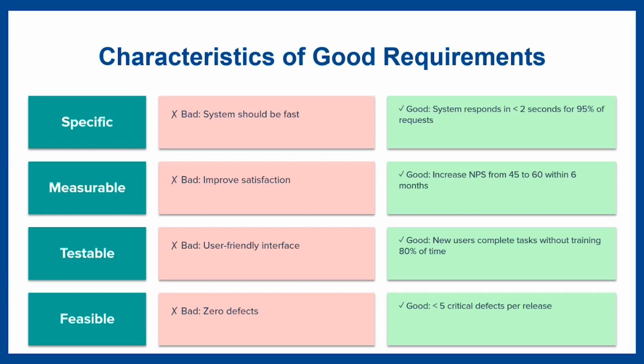A good example of a testable requirement is users should be able to upload a file up to 10 megabytes. You can definitely test that. And the reason why this matters is testability ensures quality and accountability during delivery.